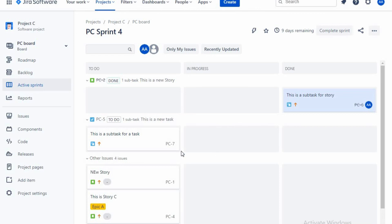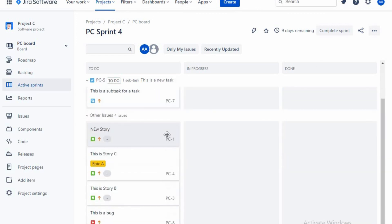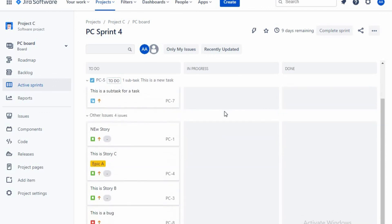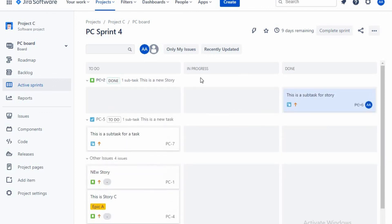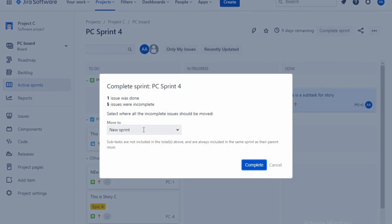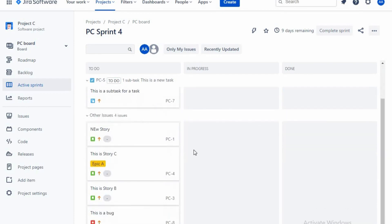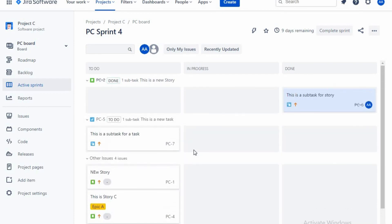So now all the stories are there in that sprint and it is in progress state. So now if you want to complete the sprint, you could complete it. As you complete, it says one issue done, five issues are incomplete. So you want to move those incomplete sprint to one new sprint, so it will automatically get moved to the next available sprint. So in this way, you could create, you could start, and you could complete the sprints.